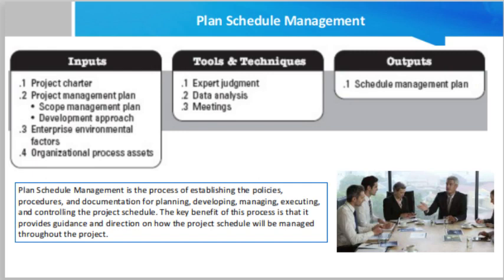Organizational procedures links. The work breakdown structure, WBS, provides the framework for the schedule management plan, allowing for consistency with the estimates and resulting schedules. Then, friends, next one is project schedule maintenance: the process used to update the status and record progress of the project in the schedule model during the execution of the project is defined.